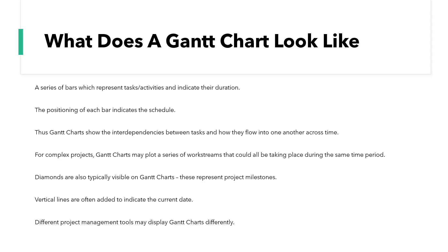So what does it look like? I'm going to give you a couple of pointers and then show you an example on screen. Gantt charts are essentially a series of bars which represent tasks and activities and indicate their duration. The positioning of each bar indicates the schedule. Thus Gantt charts show the interdependencies between tasks and how they flow into one another across time. For complex projects, Gantt charts may plot a series of work streams taking place during the same time period. Diamonds are also typically visible on Gantt charts and represent project milestones, and vertical lines are often added to indicate the current date.